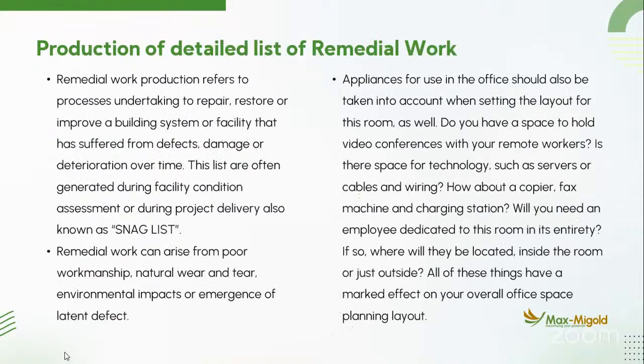So, production of detail of remedial work. Most of the time in new projects, you call this one a snag list. When you do a new building, you yourself as a facility manager, the construction company and their team, and your own team as well, come to site to assess every part of the building.